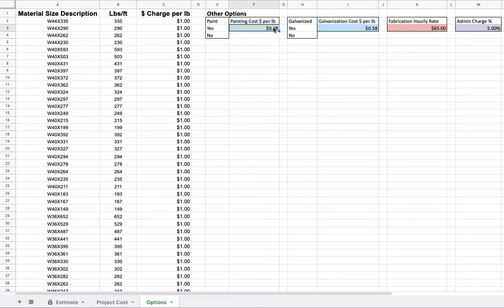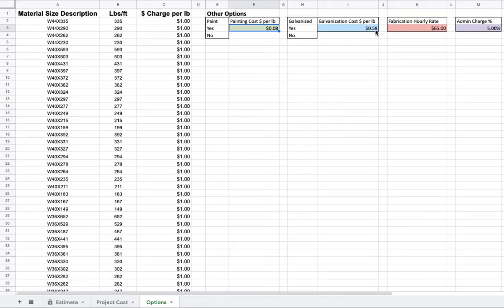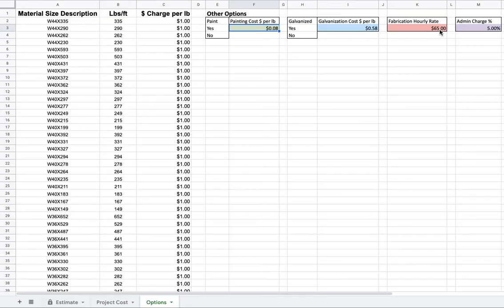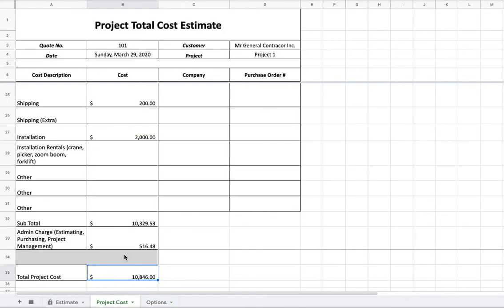Moving on. Up here, paint costing per pound. I have it at 8 cents per pound. You can change that however you like. Right here, galvanizing cost per pound. You can call your galvanizer and find out what he charges and adjust it accordingly. Fabrication hourly rate. This is your shop rate. Shop hours times this equals how much that's going to go on the project cost. Put your own shop rate there. And then your admin charge, 5%, which is what I showed you right here.